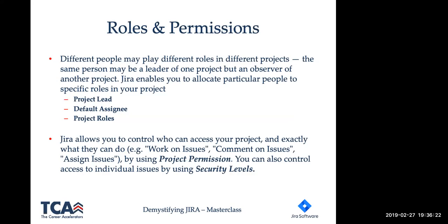So for example, you could have a project administrator with the ability to create issues, delete issues, edit issues, etc. But you can also decide that there are some people that need to have visibility to those issues, but they don't necessarily need to have the ability to edit those issues. So for example, it could be a business stakeholder that just needs to read the issues within the project. What you would give them is a business user access, which allows them to just read the issue or the issues within the project. So there are different roles within JIRA.